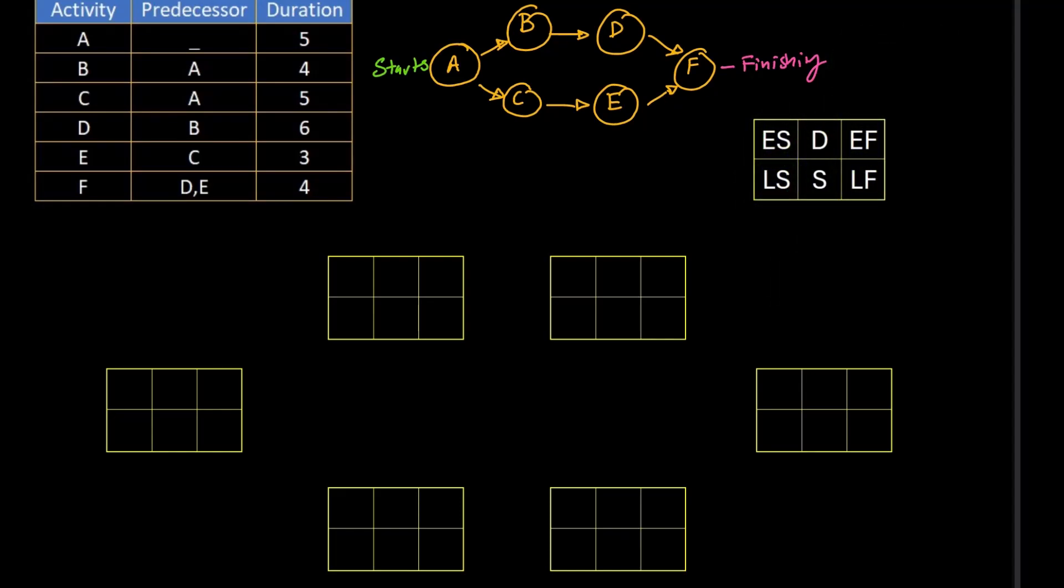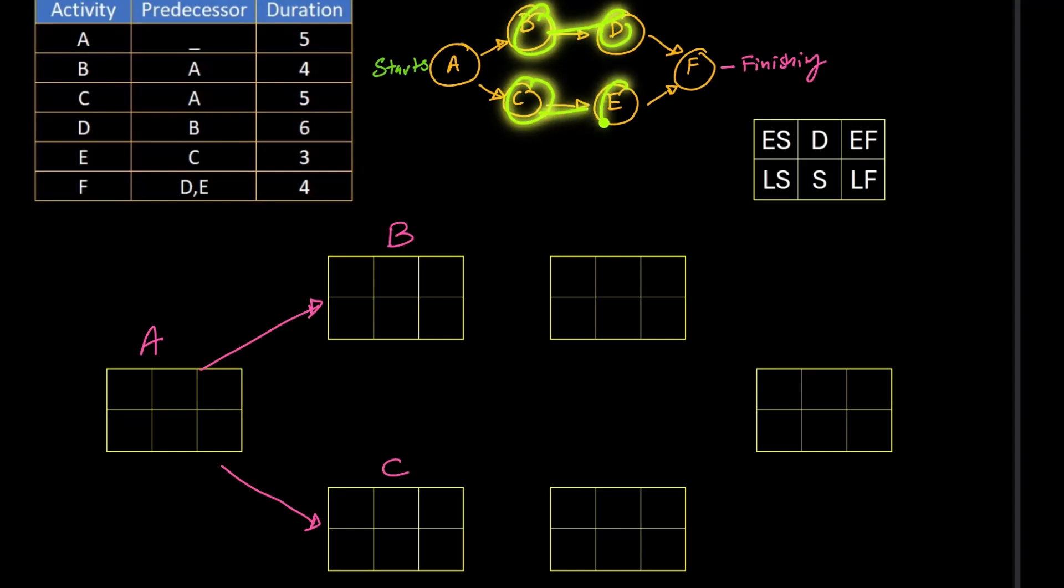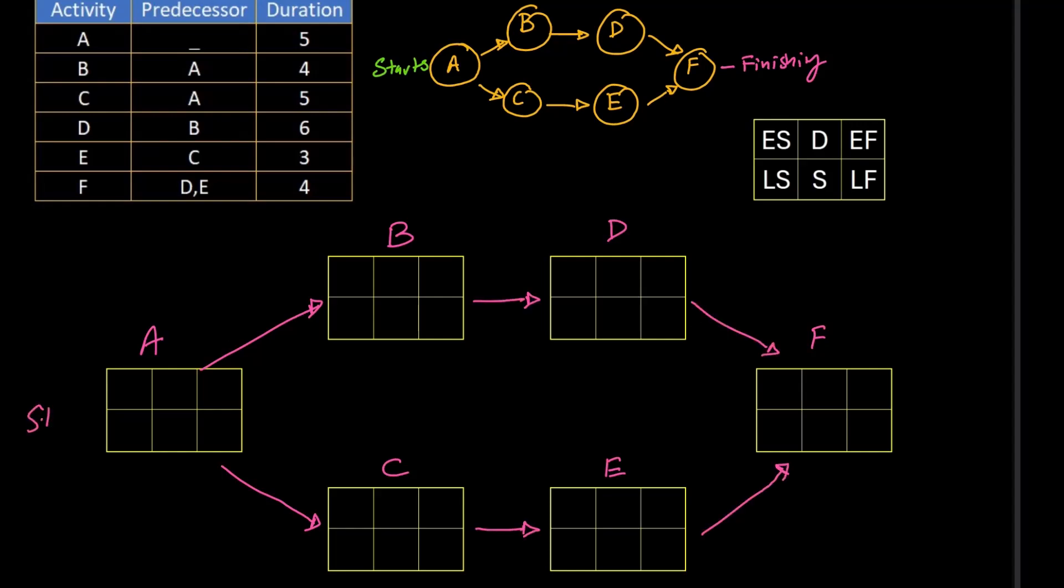Firstly we will label the activities. This is A which initiates B and C. After B is finished, D starts, and after C is finished, E starts. And the final activity is F. That's the start of the project and that is the finished project. First we will fill out the easiest part which is the duration of the particular activity. A duration is 5, B's duration is 4, C's duration is 5 and so on.